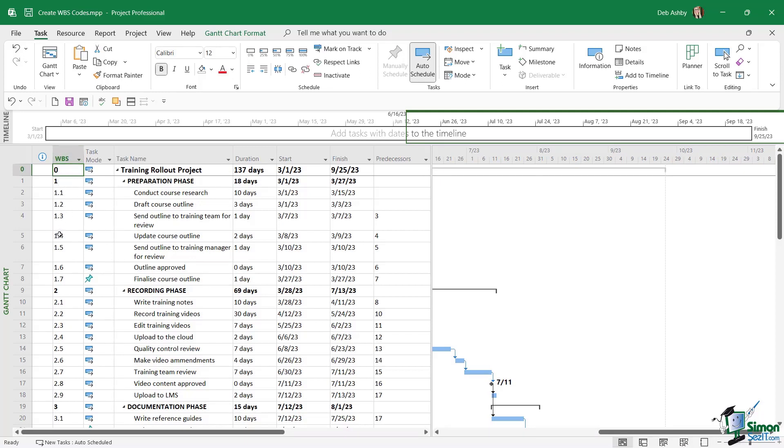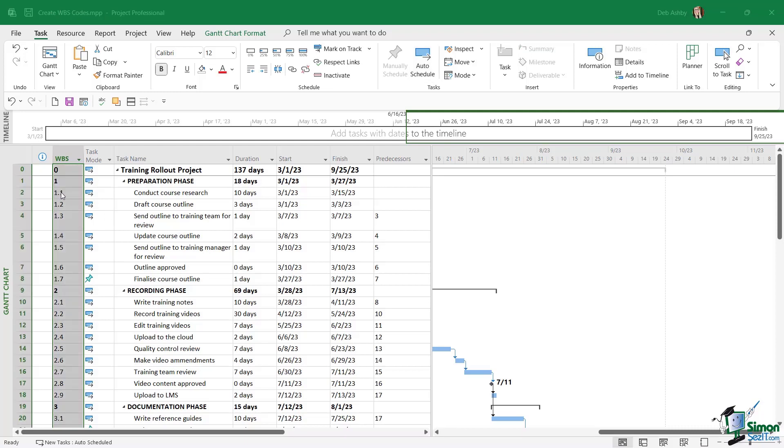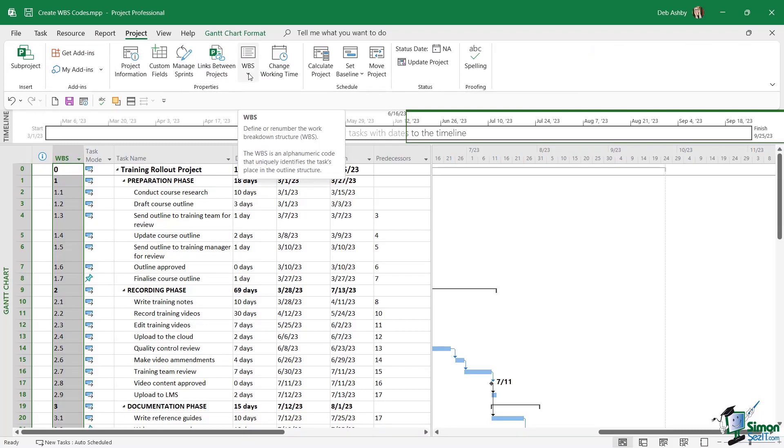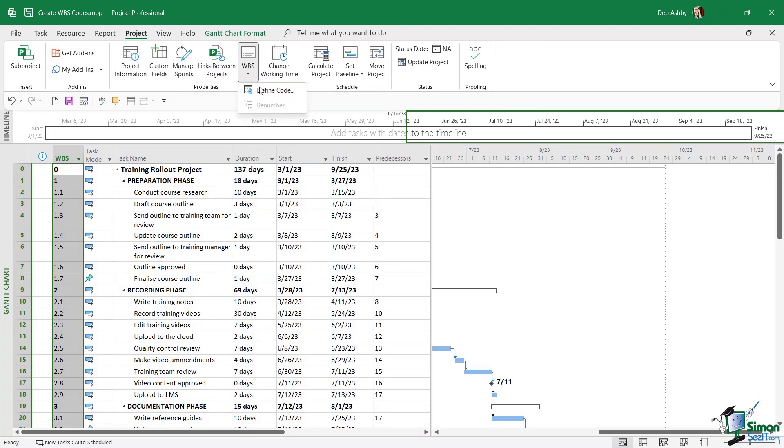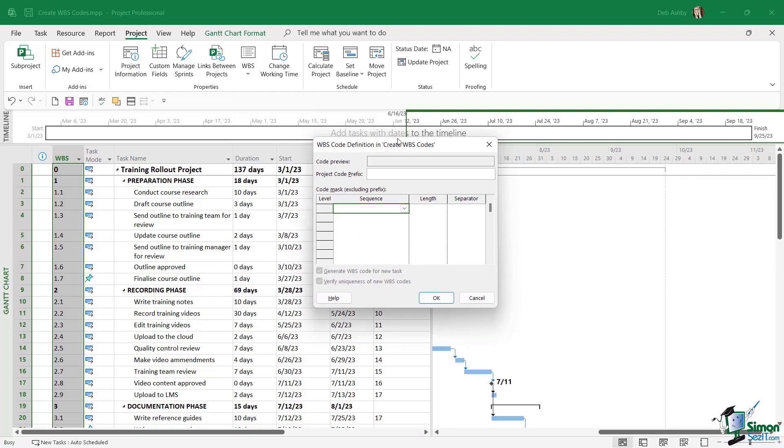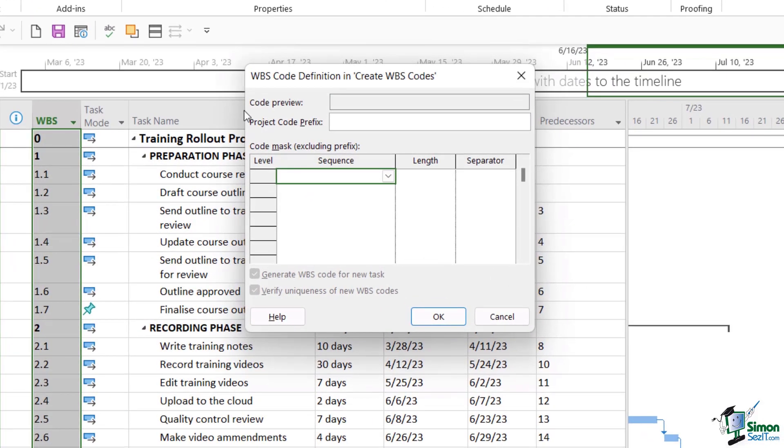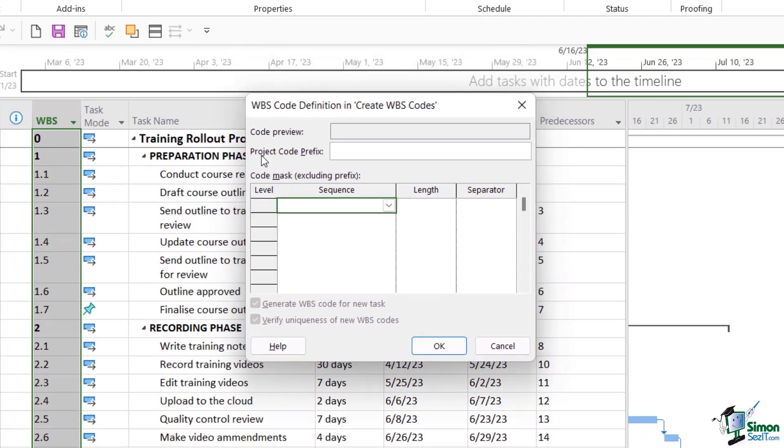Now we can create our own custom numbering to make this a little bit more relevant to the project that we're working on. So let's take a look at how we would do that. So to create our own WBS codes we need to jump up to the project ribbon, and in the properties group we have a WBS option. If we click the drop down we can go to define code, and this is where we can create our own work breakdown structure codes.